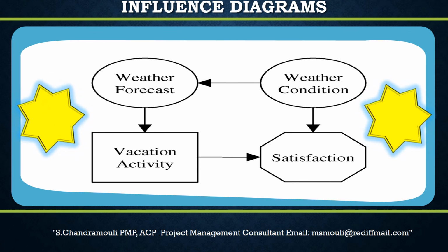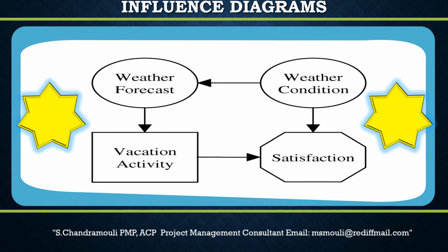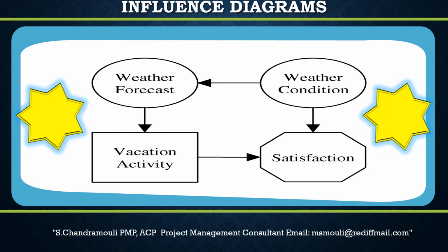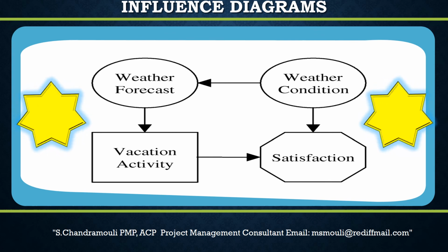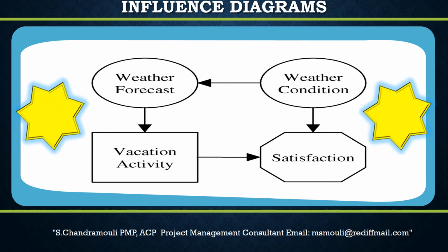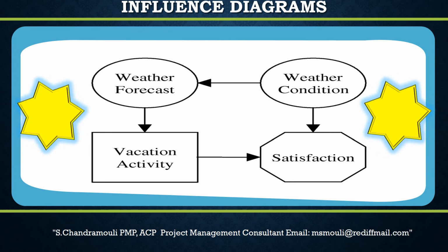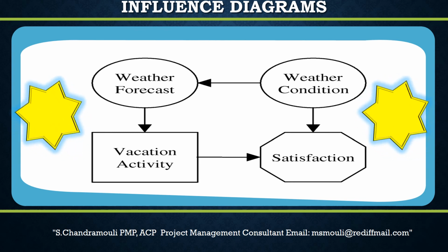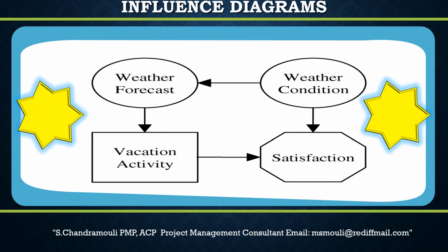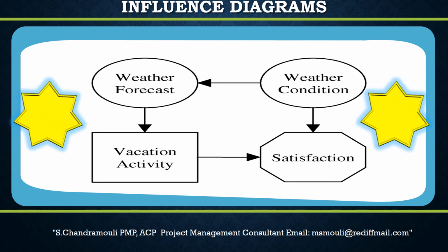Let's look into the details of influence diagram. Influence diagrams are graphical aids to decision-making under uncertainty. An influence diagram represents a project or situation within the project as a set of entities, outcomes, and influences, together with the relationships and effects between them. An influence diagram is an intuitive visual display of a decision problem. It depicts the key elements, including decisions, uncertainties, and objectives, as nodes of various shapes and colors. It shows influences among them as arrows.